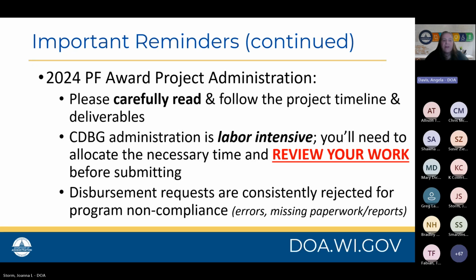So grant administrators and others who are managing the project really need to pay attention and read carefully through things. Again, Joe and Sally will be covering this more. I'm just here to emphasize, listen when they're talking about them, because they're very important for you to maintain compliance. Non-compliance can result in funds being rescinded, whether that be an entire grant or a portion of the grant lost due to a non-compliance issue or delay issue. We want to ensure that you are successful, and we're providing this guidance and these reminders for that.